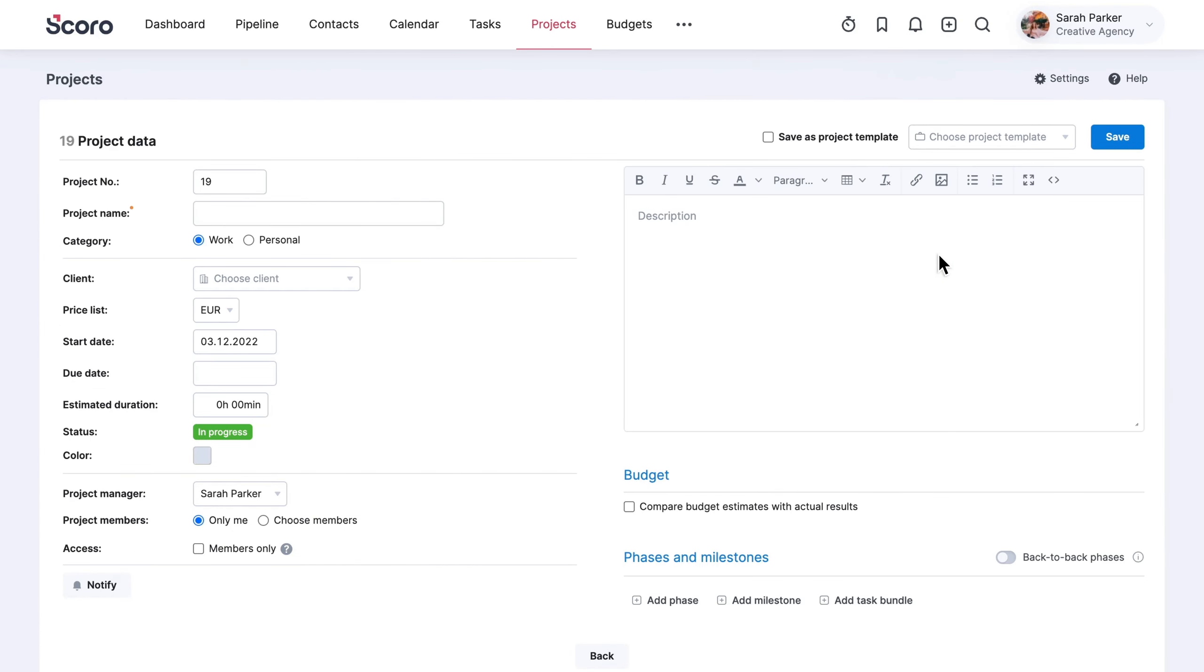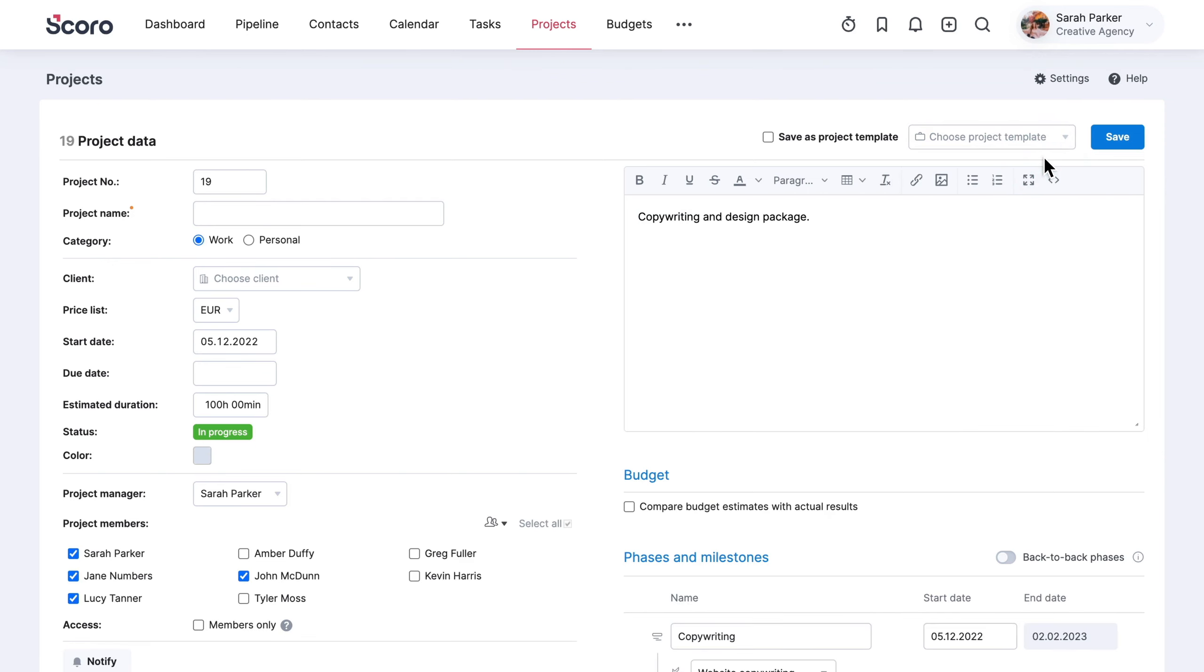You can create a new project from any view in Scoro using the quick actions menu. Now, whenever you sell your standardized offer, populate the new project plan with the template data. With everything else pre-filled, you only need to update customer information to launch the new project.